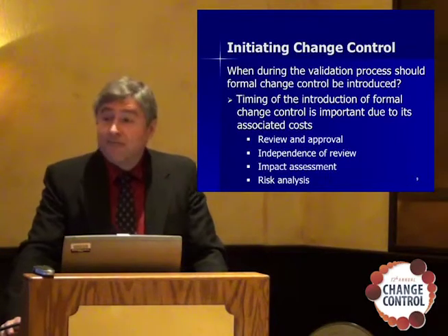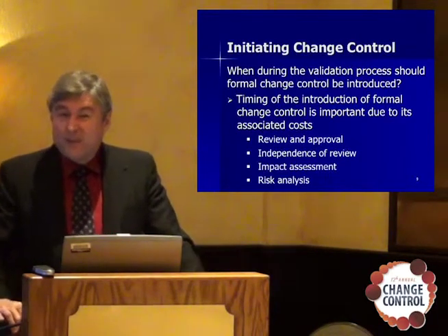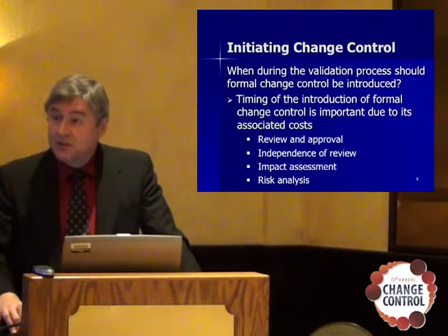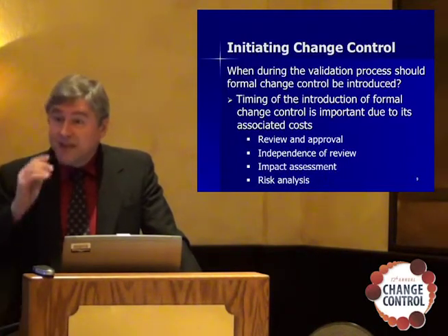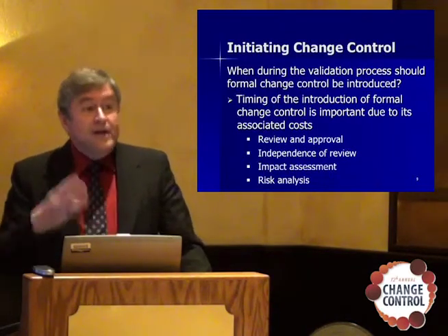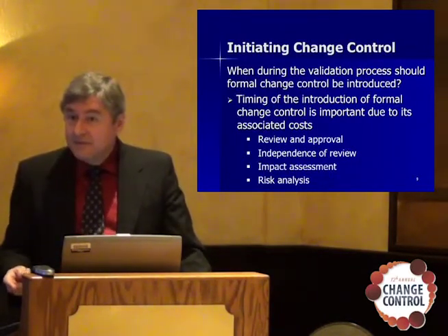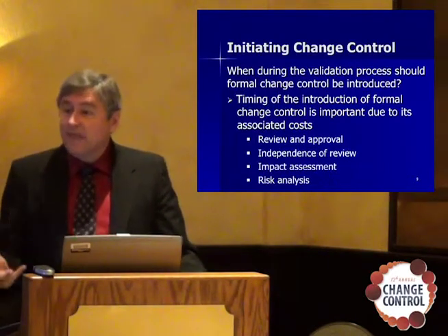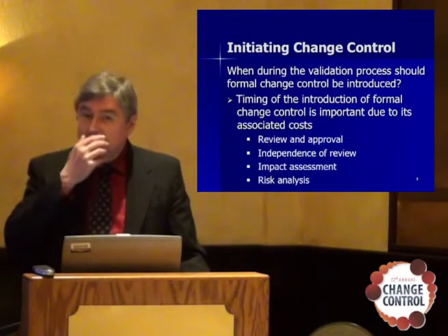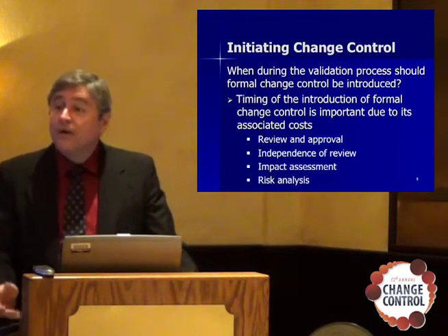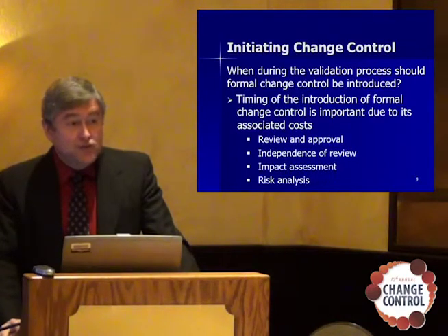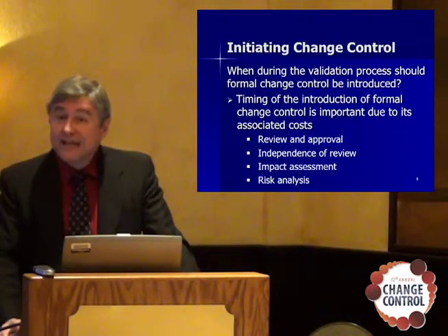We all know that up front, when you're still kind of figuring things out, a project does need to be very nimble in terms of change. It needs to have some fluidity, some flexibility, to be able to update its requirements on a very quick cycle. So it's in the learning phase. It's like an infant, still learning how to do things. They change very quickly. So formal change control that early in the process is actually detrimental.